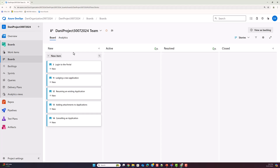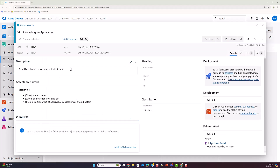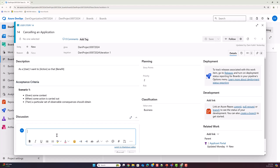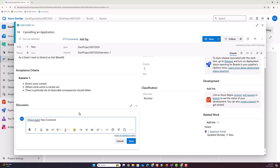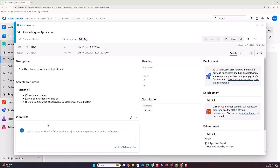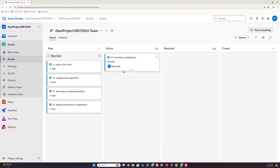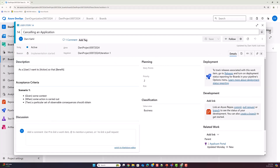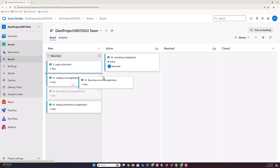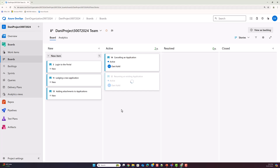Back to stories — the way I use boards is that user stories get enhanced with additional details. You can add descriptions, populate acceptance criteria, add comments and tag people. When you add a comment tagging someone, that person will receive a notification. You can add additional details and collaborate on the user story card. Once a story is being worked on, you can move it to 'Active,' meaning the dev team is collaborating on it, and continue moving it through stages: New, Active, Resolved, Closed.